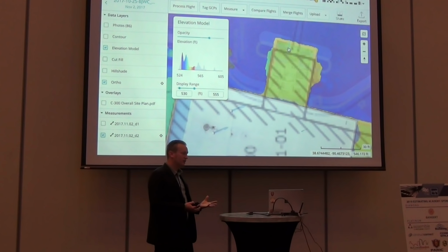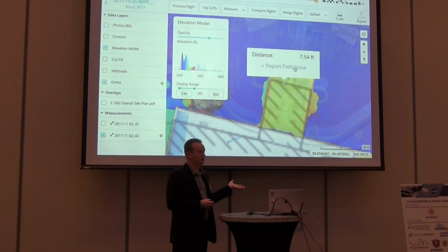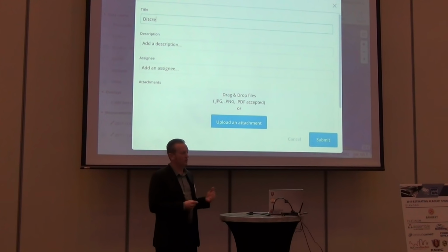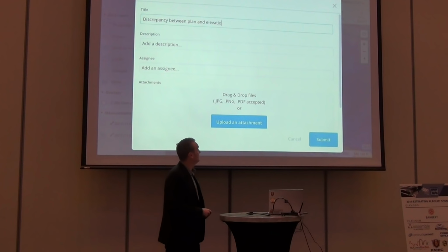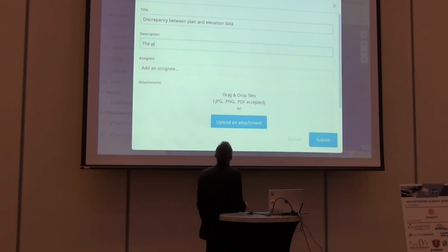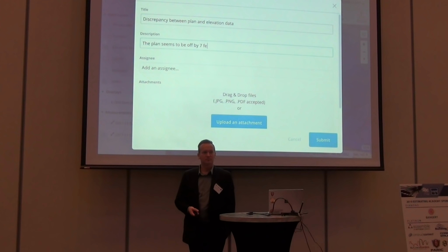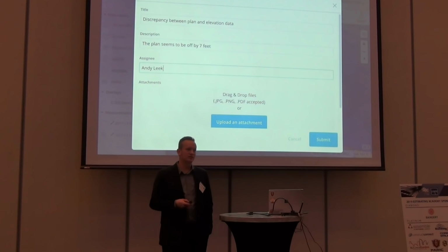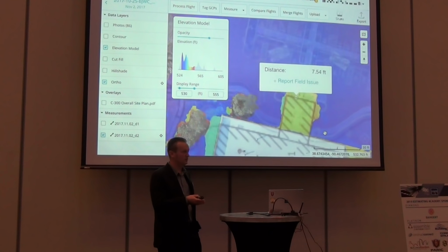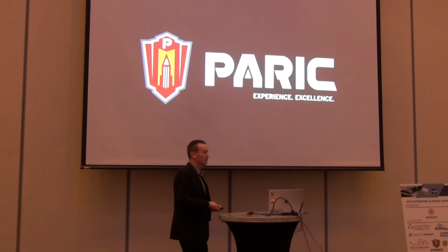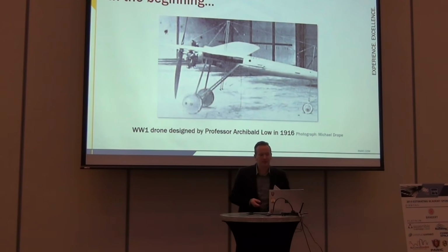And because it's all integrated together, we can submit an issue, which ultimately will become an RFI, in this particular instance, back to the project team without ever sending an email. No email. Email bad. Right? So this lands into an issue management tool, and now it's actionable data. It's not in a silo. It's in an actual issue management tool that's assigned to someone so that they can respond to it. And if it needs to become an RFI, we can go to that next step. We'll come back to that here in just a second.